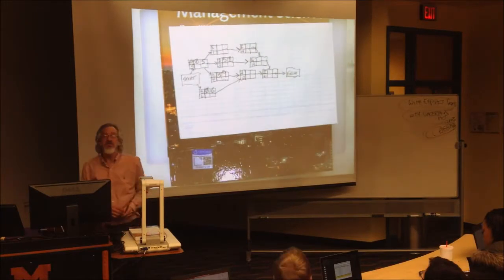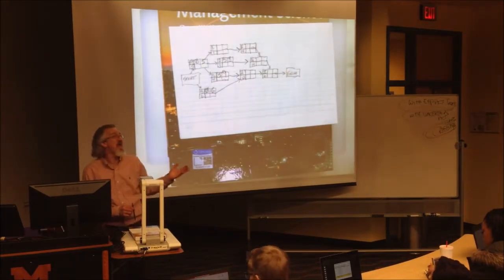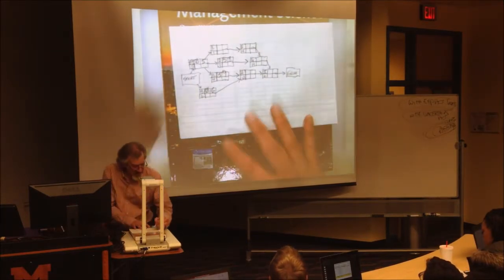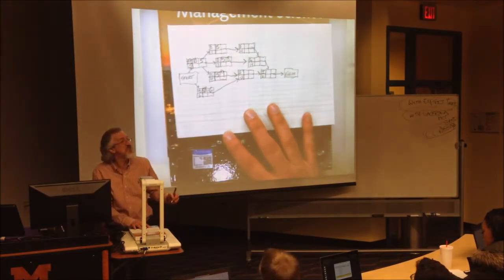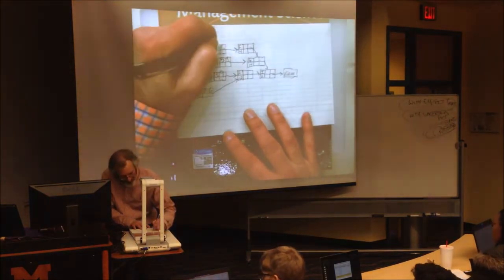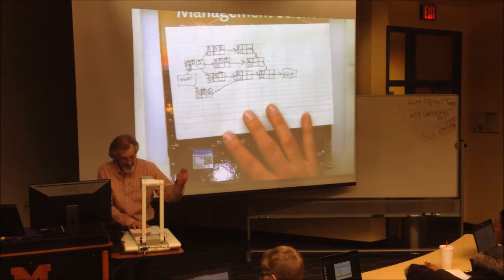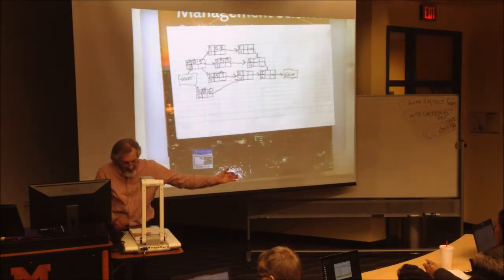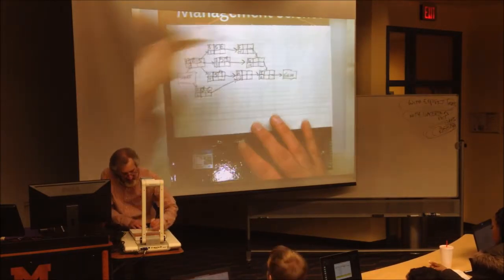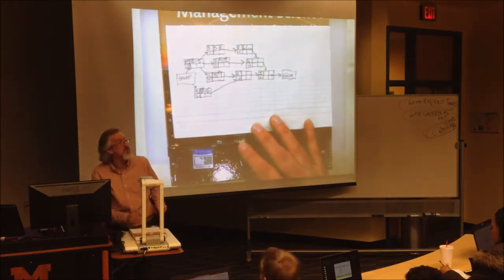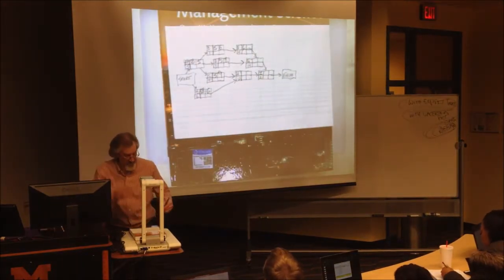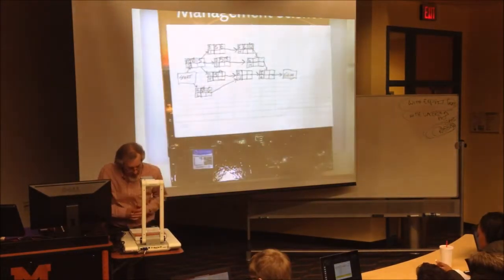Let's go to E. E is preceded by A, which ends on day 5, so it has to start on day 5 and finishes on day 6. You're getting this. This is almost too easy, isn't it? Let's keep going. Where's F? F is preceded by E. E gets done on day 6. F should finish as early as day 10. You're getting it. Let's go to G.